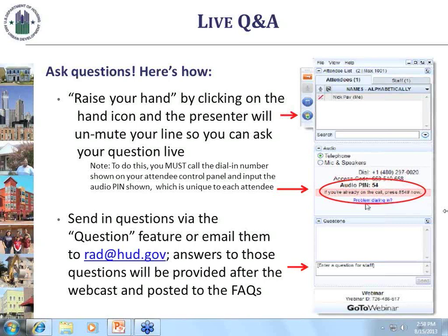Yeah, as long as the last phase of units, are those units still staying as public housing until you give us the financing plan? It probably would. As long as that's okay, that's the catch. We don't want to release any units, allow you to do something with the site, unless we know we're going to get something back.